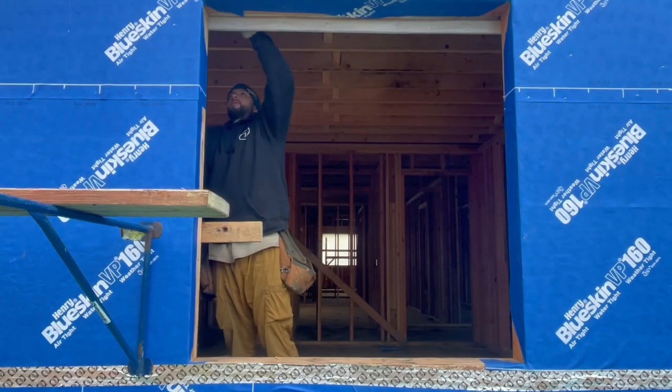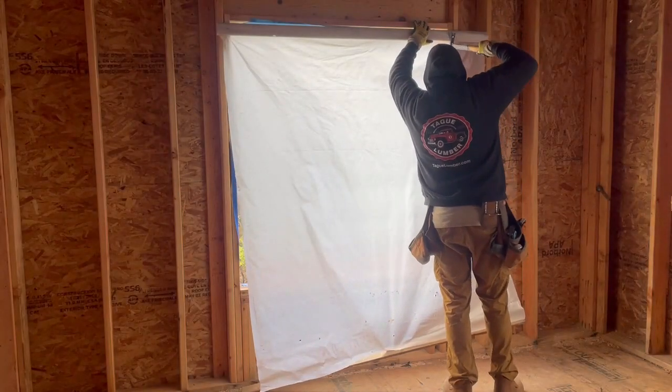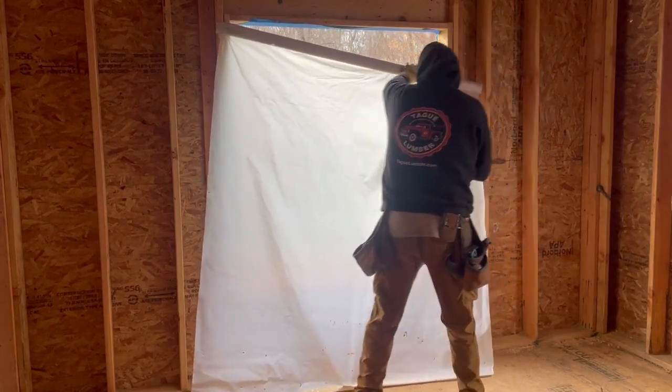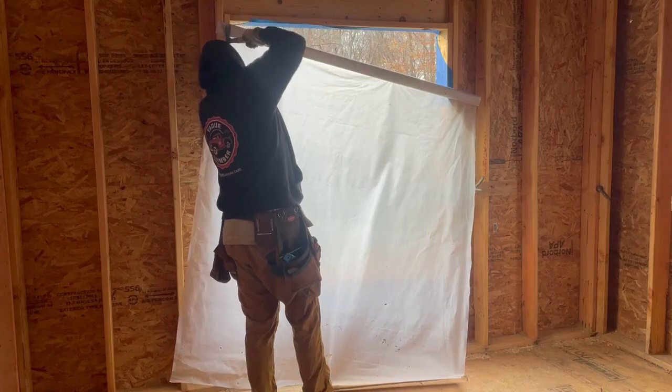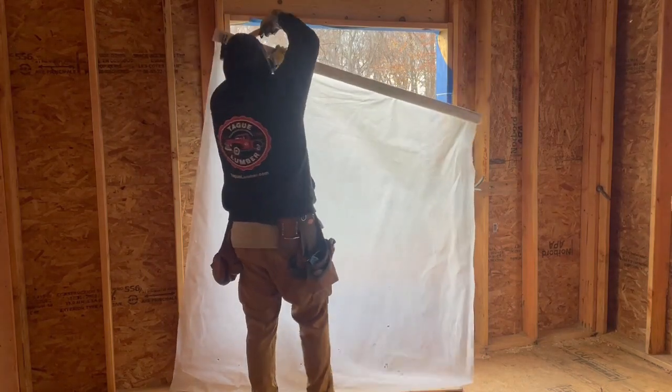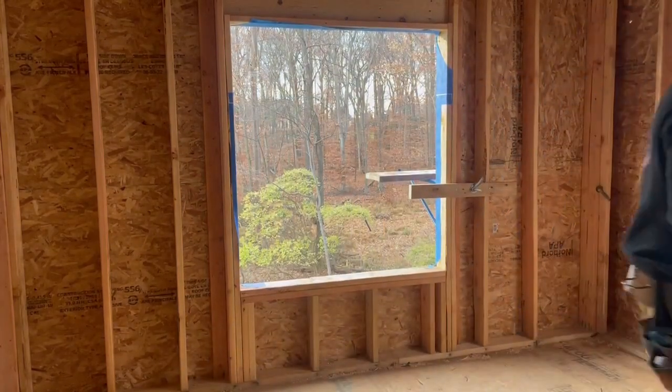An example of this battle is our windows. We ordered our windows 18 weeks ago. 18 weeks ago, we didn't even have our first floor deck framed. COVID has thrown a wrench in most of the professional world, but it's out of our control, and our only option was to find ways to continue to move the project forward. Hence the poly windows.